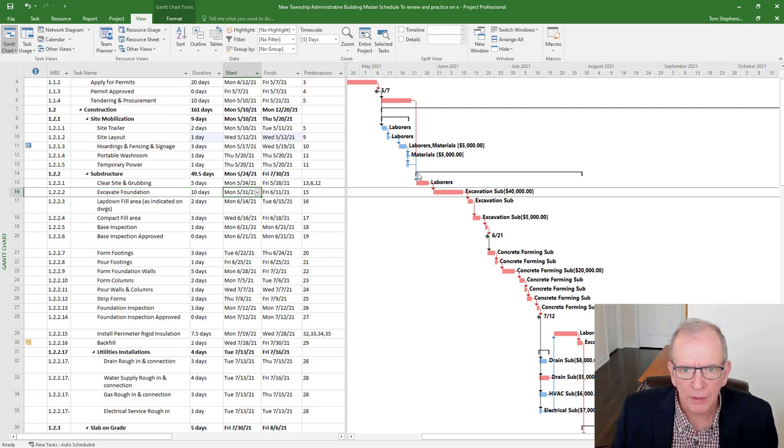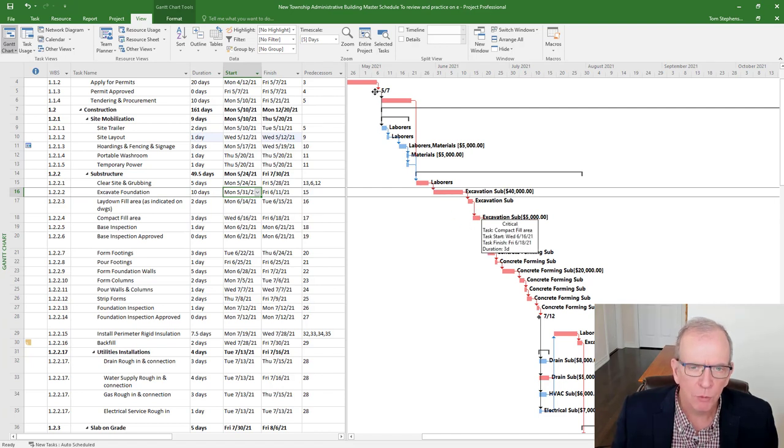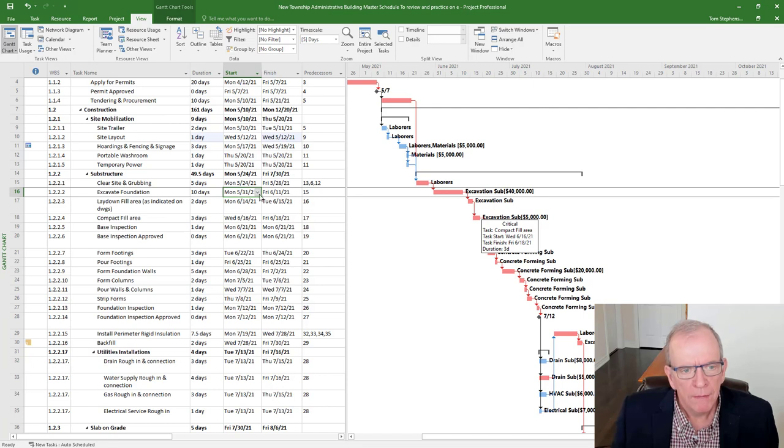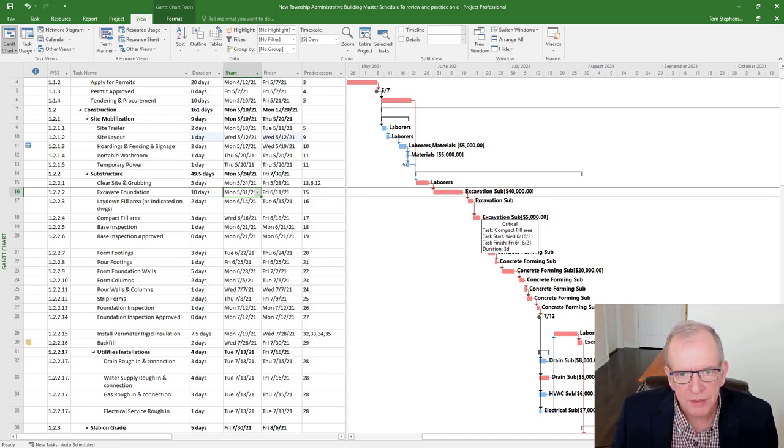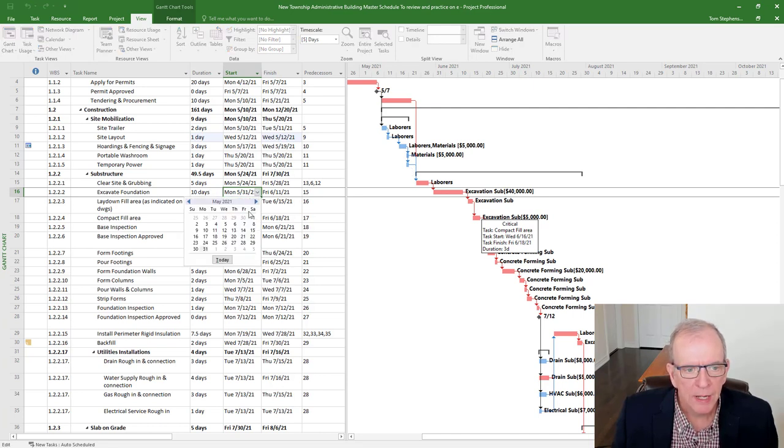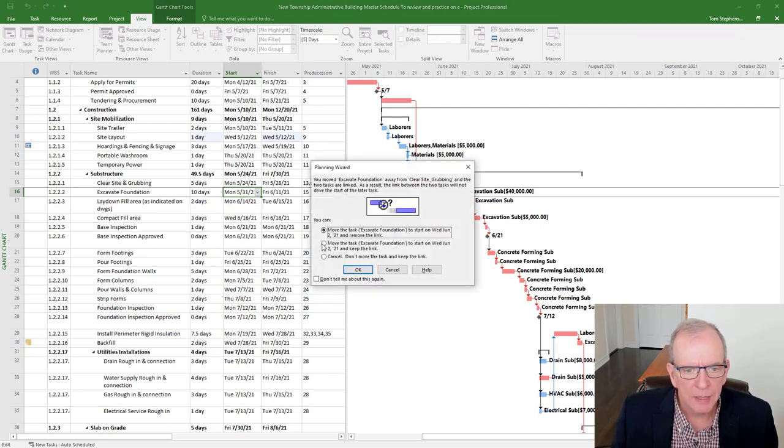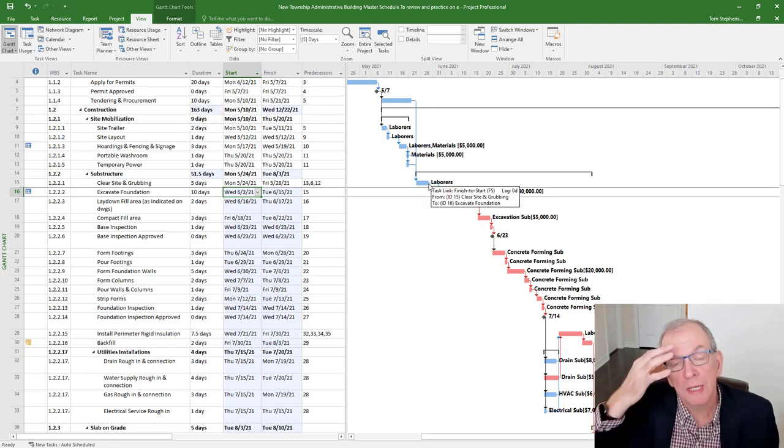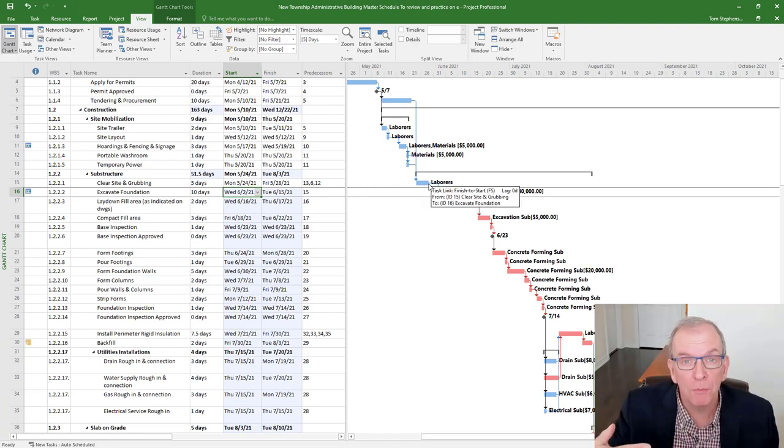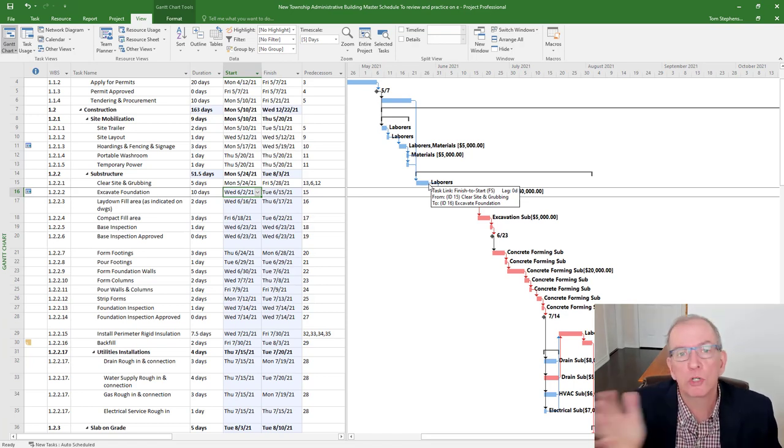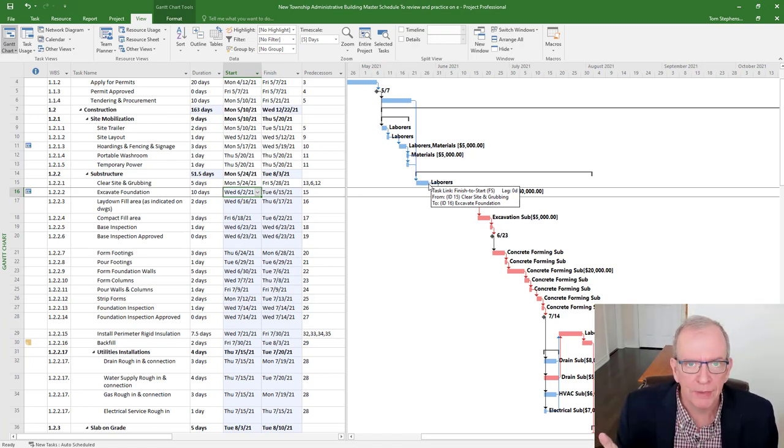But you should also notice too, that if I put a constraint on an activity, very often it will get rid of the critical path. And the critical path is the longest path through the project. If you want to have a better understanding of critical path, look through some of my other videos, and you'll see I have videos dedicated to that. But in brief, the critical path is the longest path. So this path is not on the critical path. It's got some float.